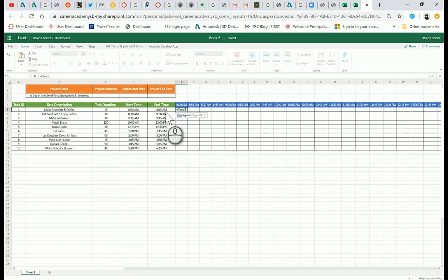Okay. And my first logical test is this number greater than or equal to this number, comma, the second part of the AND, because it's a statement that requires two true premises, or two true statements. Okay. Is this less than or equal to this number? Okay. And if it is, what do I want to do? Oh, wait. Close that, because that ends the AND. Then, if true, what do I want to do? If true, I want to put a nice big X in this cell. If it's not true, I don't want to put anything in that cell.